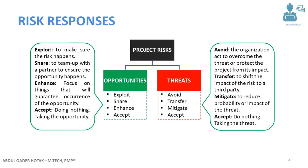Transfer means to shift the impact of the risk to a third party. We're all familiar with insurance. If companies foresee risks for their projects, they buy insurance for that specific part of the project. When the risk happens, the third party — the insurance company — pays the price for the risk.